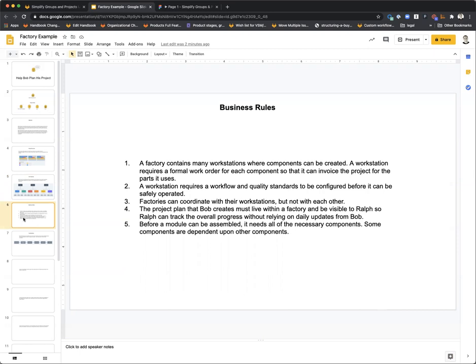Here are the business rules: a factory contains many workstations. A workstation requires a formal work order for each component before work can get started. Each factory invoices the project for the parts it uses. A workstation requires a workflow and quality standards. Factories can coordinate with their workstations but not with each other. The project plan that Bob creates must live within a factory and be visible to Ralph so he can track overall progress without relying on daily updates from Bob. Before a module can be assembled, it needs all the necessary components, and some components are dependent upon other components.